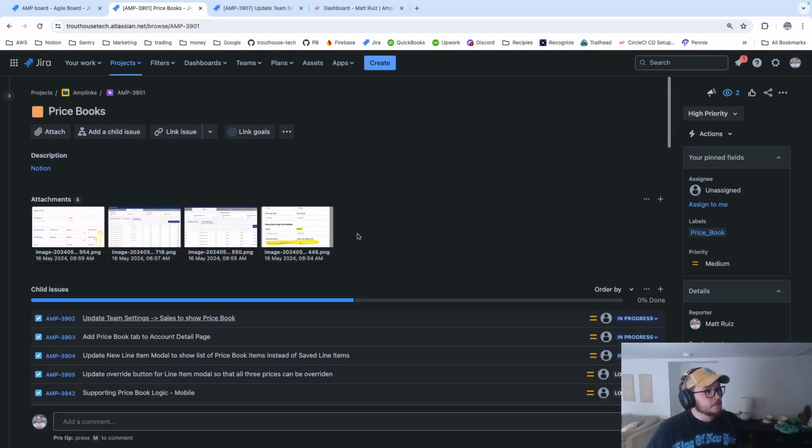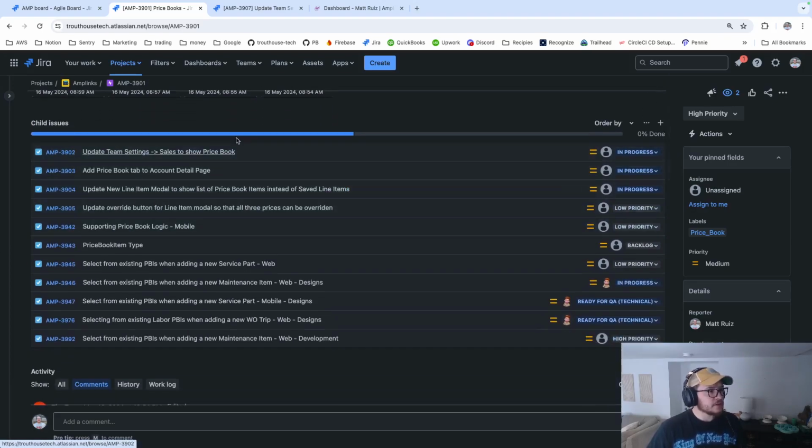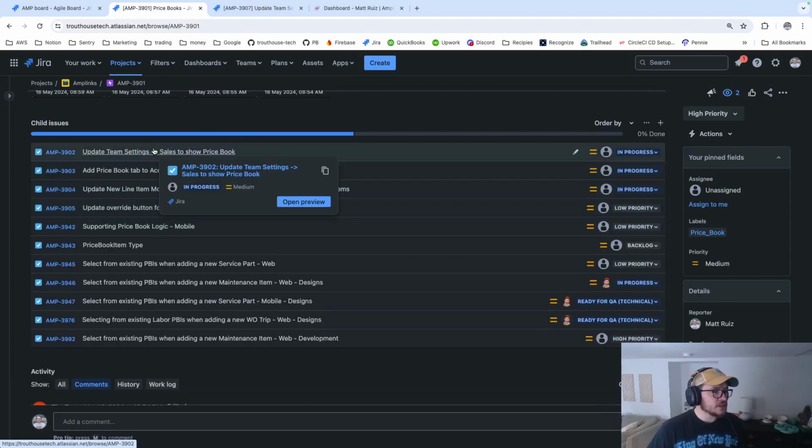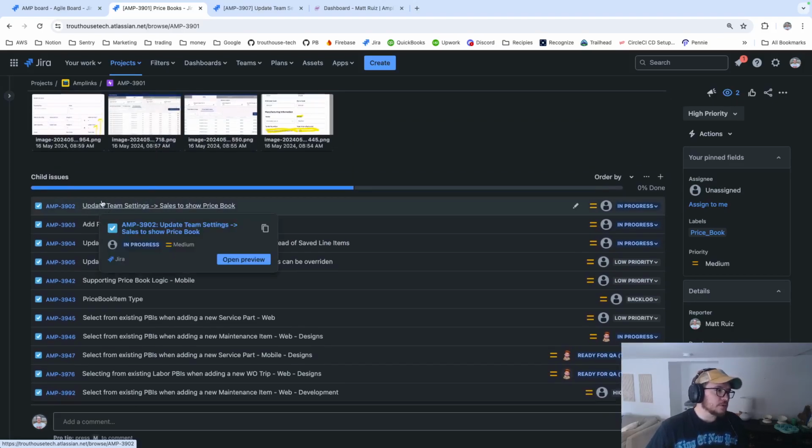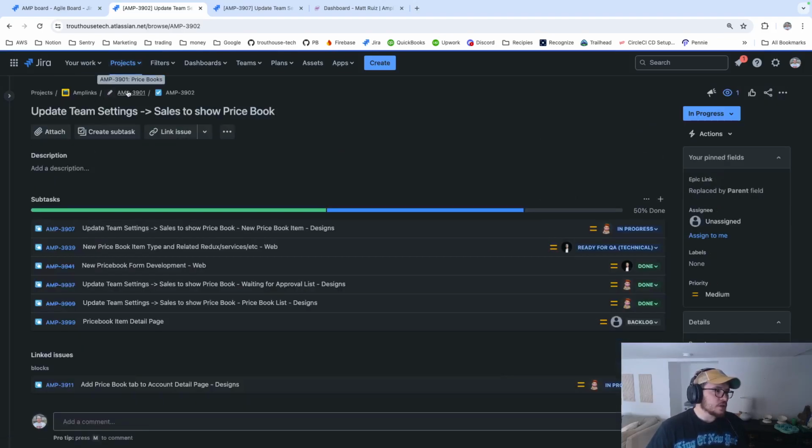With these big tickets, within the past 6 months I've been creating a root epic for that. And then for the many different scenarios and use cases, I generally try to follow a similar flow where we have an epic, we have a single issue or task, and then this task has subtasks that are relevant.